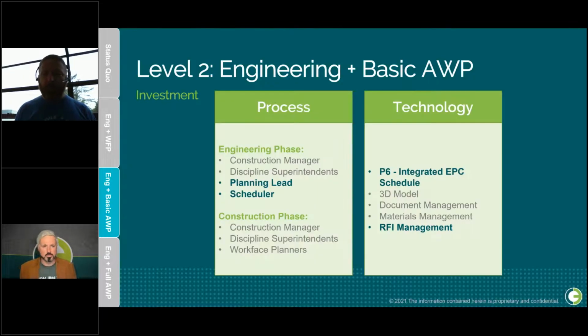From an investment side, what you're seeing here is, again, the same level of construction manager and discipline superintendents during engineering, but we're taking that a step further now. Now we're bringing in our planning lead and our scheduler to make sure that the schedule between engineering and construction makes sense, is integrated, and supports that path of construction. So the step up on the technology side is your P6 schedule suddenly becomes, instead of a disparate group of people trying to hand deliverable dates to each other, a truly integrated, logical, sequential EPC schedule.